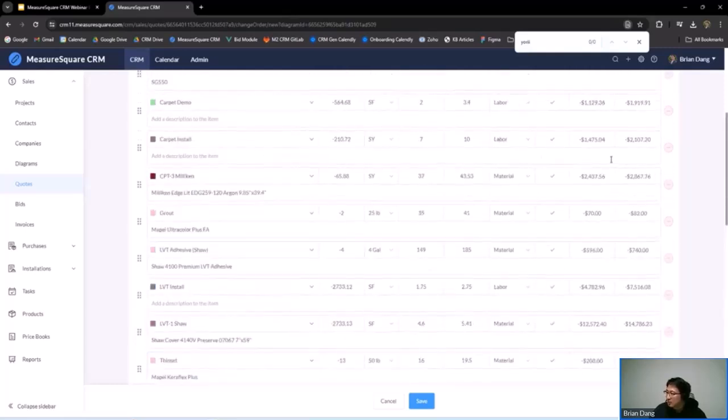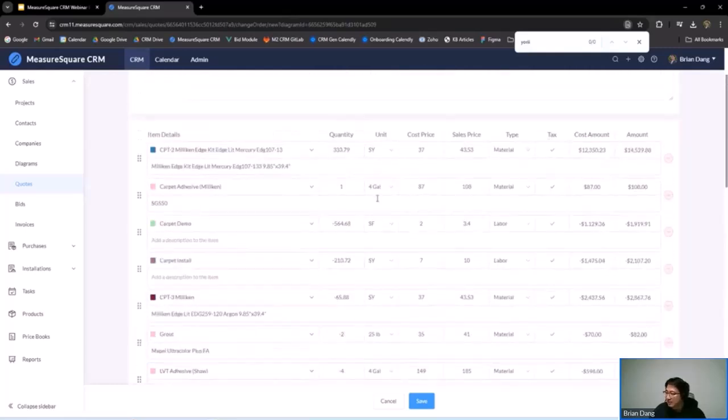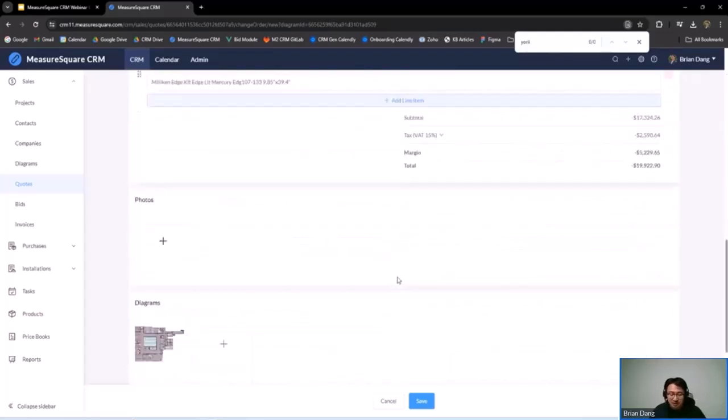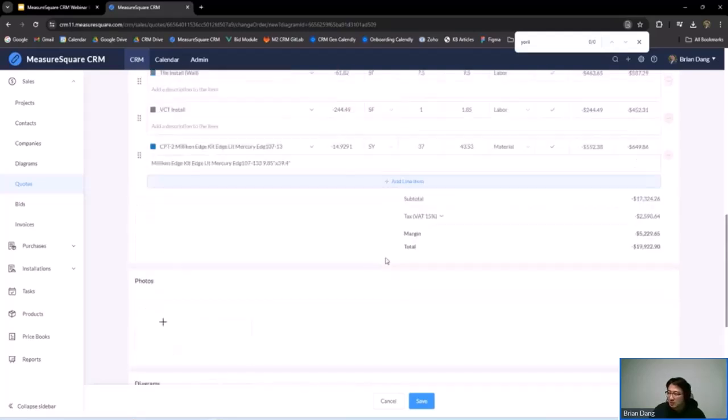Okay, we're removing all these products. We're adding this product, the adhesive for it as well. And this is a really powerful tool. I've seen some examples where a GC might try to replace a product to a cheaper one, but things like the labor and adhesive for it are more expensive. So they might be confused at why they're not seeing the price drop they expected. Right here, none of those questions exist. They could see a breakdown and you could explain it to them as well.